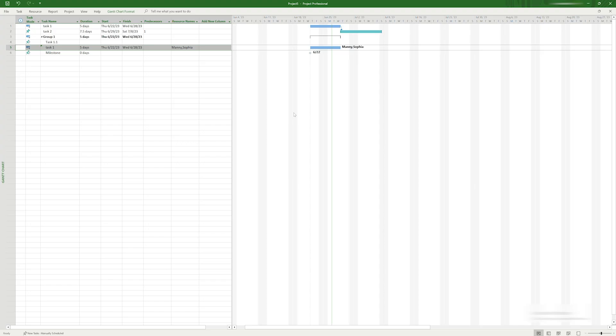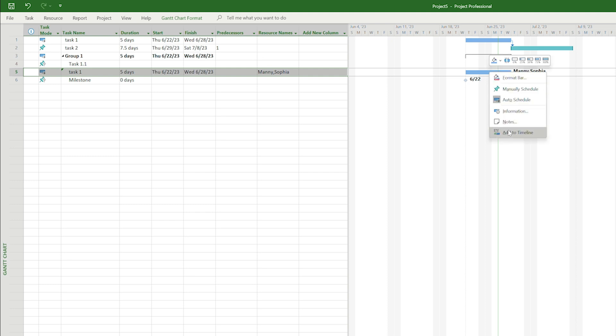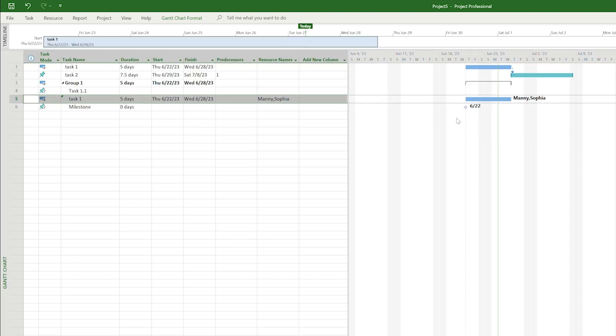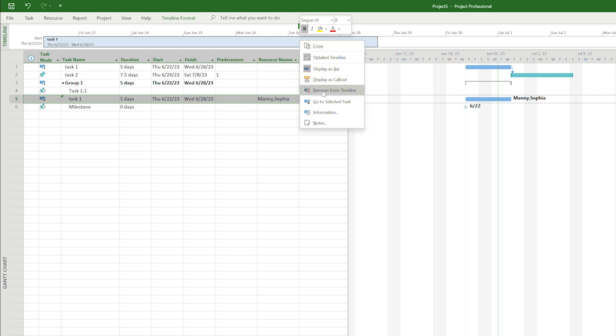Now let's talk about the timeline. Notice that at this point there are no tasks in the timeline section of the screen. The timeline view only shows tasks that you choose to show there. This can be helpful for major tasks, milestones, or summary tasks to get a high-level view of your project. To add a task or milestone to the timeline, right click on the task or milestone name and choose add to timeline. To remove a task, right click on it in the timeline and choose remove from timeline.